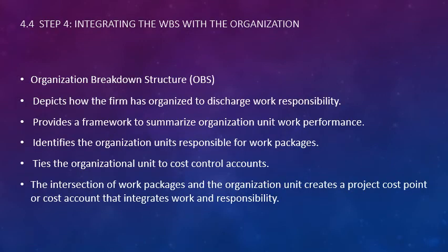So, integrating the work breakdown structure into the organization. We have our organizational breakdown structure. It depicts how the firm's organization will discharge these work packages, provides a framework to summarize organizational unit work performance, identifies the organization unit's responsibility for them, and ties it to cost control accounts. So now we know where the money is coming from for each of these different activities.